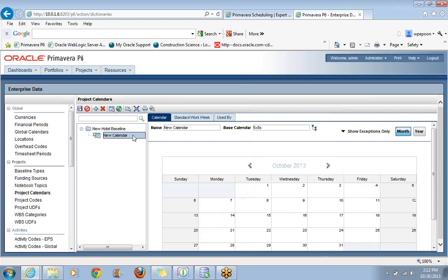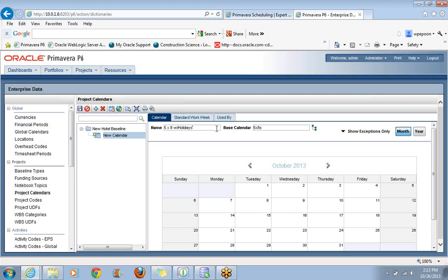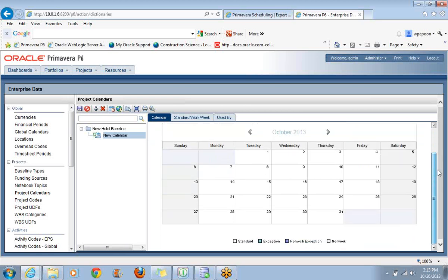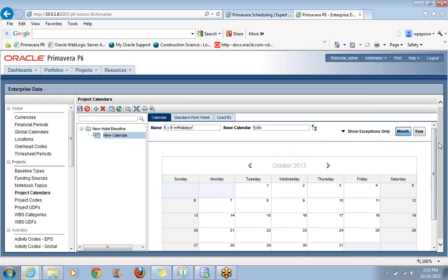That's the indicator that I can now add a calendar. Just like with P6 Professional, we don't really create calendars from scratch. We copy an existing calendar. We could copy a calendar from another project, a resource calendar, or maybe in this case I'll copy a global calendar, something like this one right here. I have to give it a name. I like to indicate what type of work day it is and work week, and also if I have holidays in my calendar. I've got to save my changes. Notice that the little floppy disk is lit up. Now it's committed.